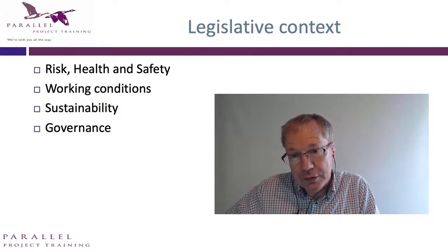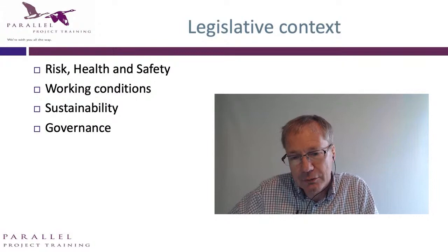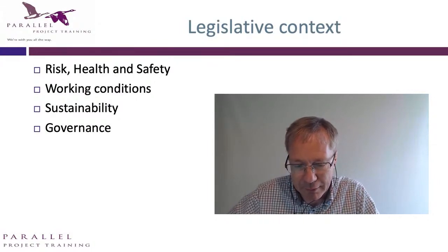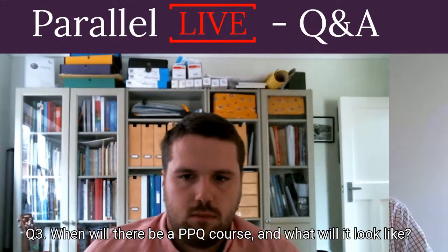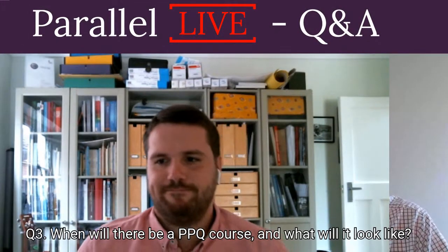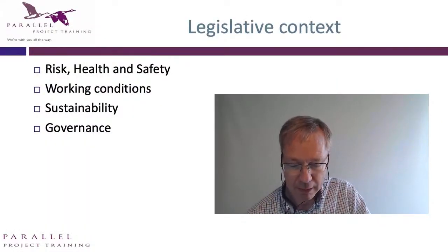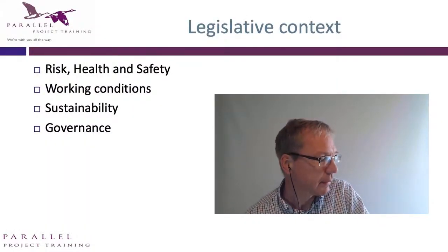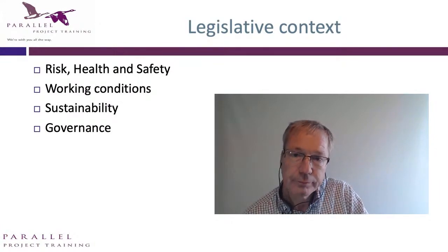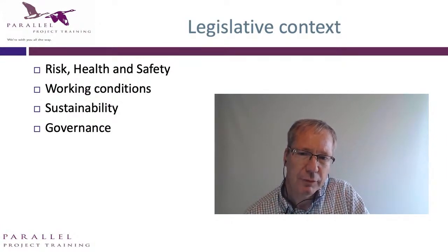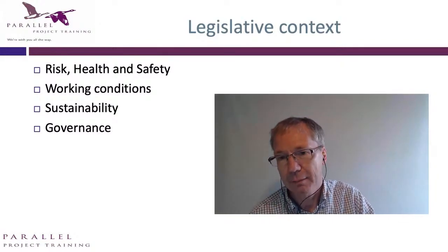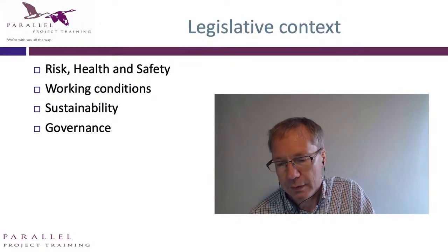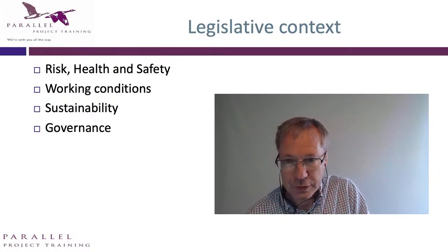The next one is governance. So that's the regulations, like internal regulations. The other regulations we've talked about are legislative regulations, so rules that apply from the legal range, outside. Governance are the rules that apply in an organisation. So things like gates, bid/no-bid meetings, who can sign a contract, who can't sign a contract, who's allowed to authorise a purchase order, who can sign off a payment, who can approve a project going from one stage to the next.